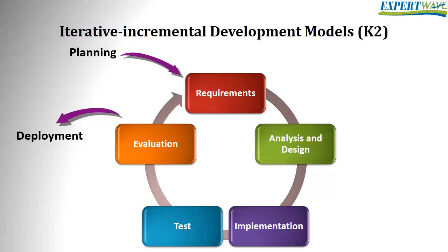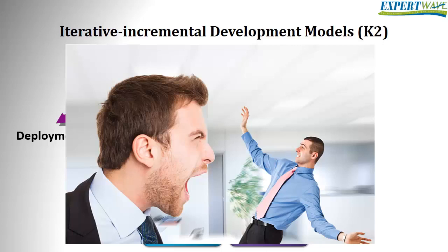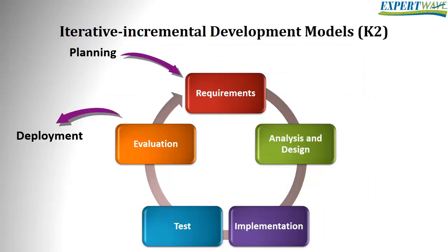This is unlike the waterfall model, where the customer is only involved during the early requirement and late deployment phases. In my early days as a software developer, I had a project where the customer totally forgot about the project and thought that my company went out of business because we hadn't talked to him for over 6 months after the requirement phase. We were developing the software, I told him, but he didn't like this. So unlike the waterfall model, a key feature of iterative development is the involvement of users in the testing. The users are encouraged to request changes to the software to meet their business needs.